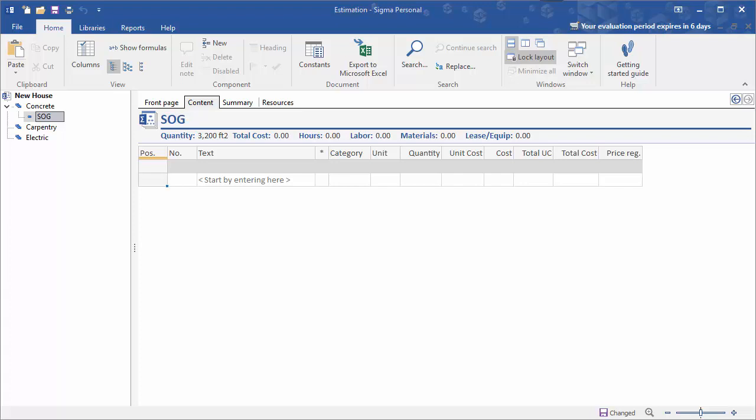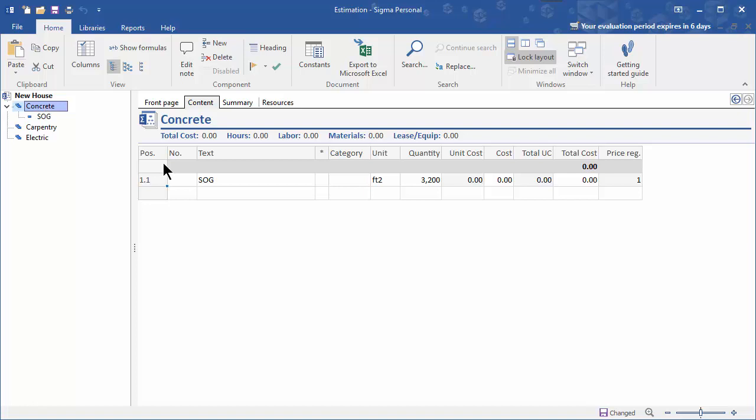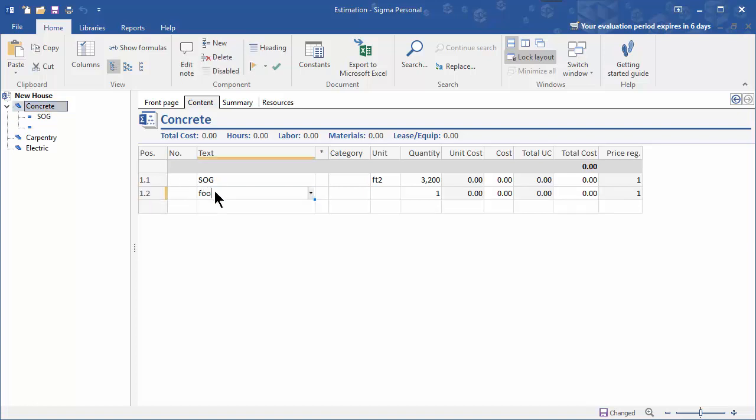We want to add additional components under concrete. Click on concrete, click in the next available line, and type your next component.